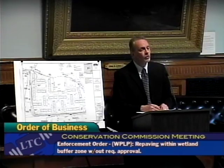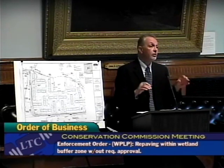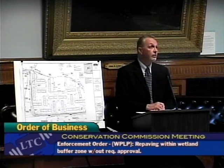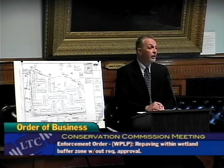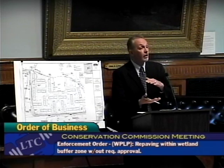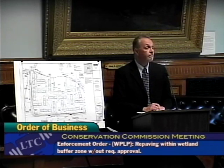Our understanding is that the scope of work to the contractor included the new pavement being a one-for-one replacement to what was milled. We can confirm that. One other approach that we could take from an investigation standpoint would be to do either a side test pit or a pavement core in the new area. So we'd be limiting disturbance and get a sense for whether our total paving section in place here is consistent with what the original design was when the facility was built, to address that potential fill issue, Mr. Chairman?